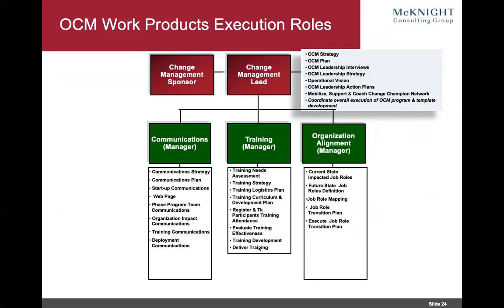So who's going to do all this work and where is it coming from? I'm going to recommend a number — it's a percentage of your budget that needs to be allocated to these types of activities. For any medium-sized project, 10% of the budget should go towards these activities.